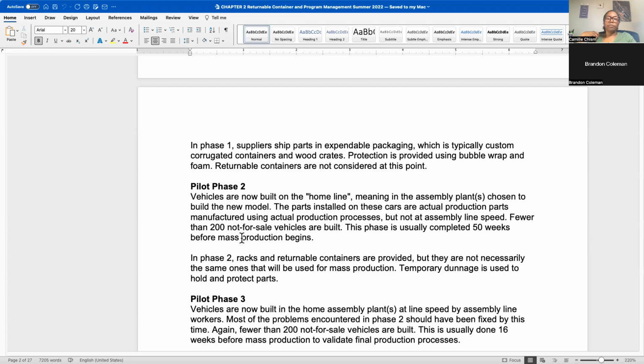So when they're ready for final production, you may not see it until then. But that makes it really hard to design packaging for it, because if you don't really know that part, they may have put a metal clip on a plastic part and that metal clip now protrudes. So now instead of getting 10 parts in a pack, you're only getting 8, but you don't really know that until the end.